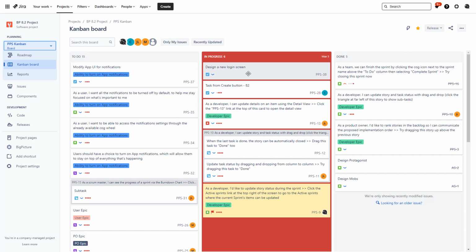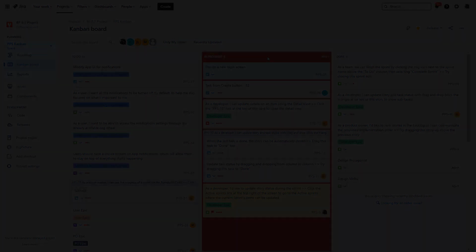One of the main principles of Kanban is that only a limited number of issues should be worked on at any moment in time. Thanks to that, users will be able to focus on issues currently in progress and deliver them faster. A well-designed Jira Kanban board will help you manage your issue queues and increase the visibility of planned work and progress made so that you can avoid troublesome bottlenecks like the one here.